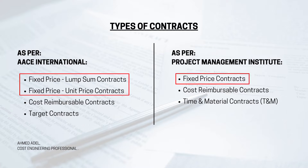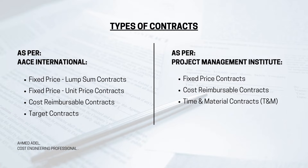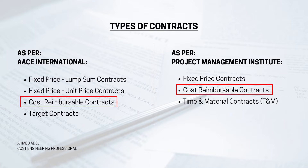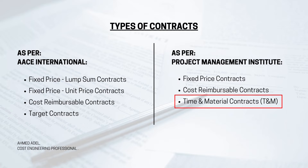As per the Project Management Institute, we have three types: fixed price contracts, cost reimbursable contracts, and time and material contracts (T&M). Fixed price appears in both AACE and PMI, but AACE splits it into lump sum and unit price. Target contracts are only in AACE, and time and material is only in PMI.